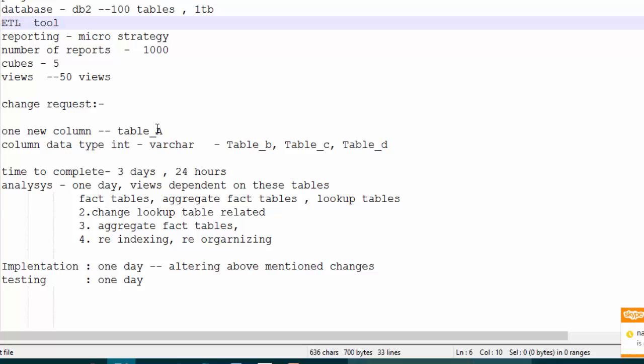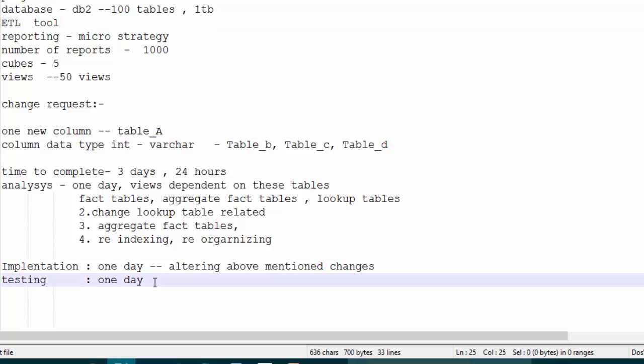Correct. What to do, because data is not getting loaded. Unless data is loaded, you can't run your report. You can't build your cube, right? Correct. We have to build the cube also, right? You missed that step also. If data is so much, some cubes might take 5 hours, 6 hours also, right? Correct. So all these things we have to take care of. If we include 2 more layers like Java, VB, we have to contact them also. Suppose they have some Java form, Java report, for example, how many forms are getting affected. That also we have to take care of, right?